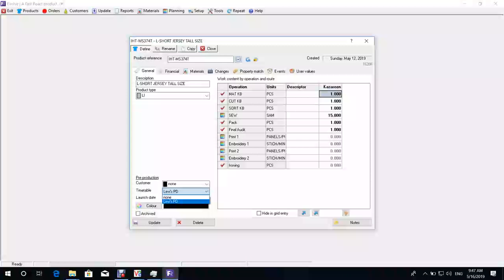And what can we set up for all customers? Then you would create one template called all, and then you would associate that to all customers. So again, it depends on which way you feel necessary to manage it. If it's an activity that's always going to be the same, then you can have it against all. Or if it's different by customer, you create a template for each individual customer, and then all the orders for that customer will have that lead time.